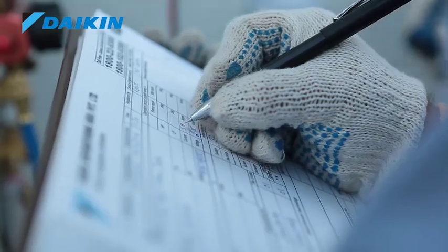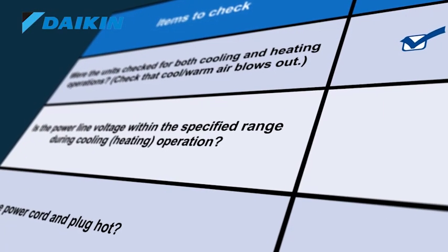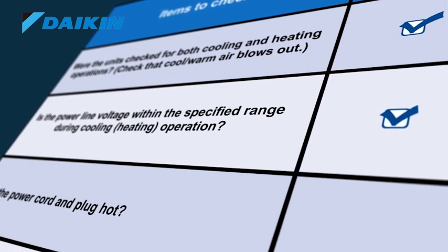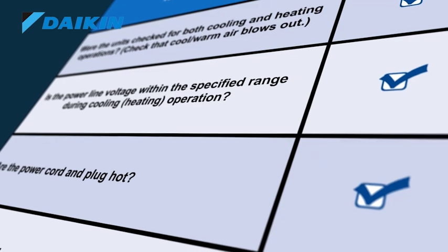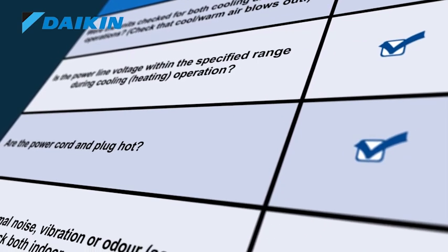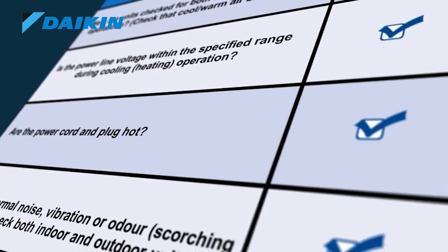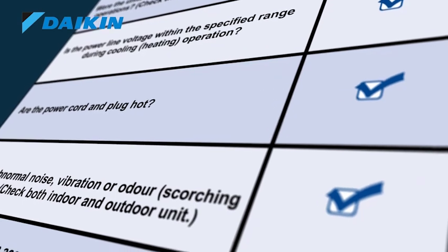Before handing over the product, reconfirm all the points stated by filling the checklist. The checklist also provides guidance during installation. It serves as control to ensure all aspects of proper installation are carried out, and any issues are identified and rectified before commissioning the product.